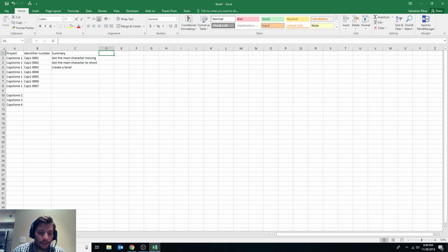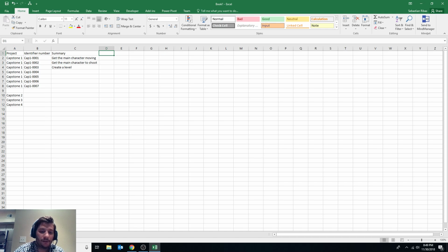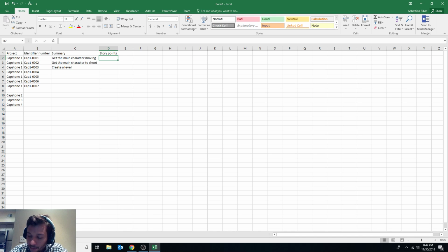And then, how much it'll take. We normally call them story points. You can also do the estimates in hours. Story points are a long conversation, but the way most Scrum masters use this is how many days' worth of work it'll take for someone to do it, so that a day for one engineer could be 4 hours, while for another engineer it could be 7 hours.